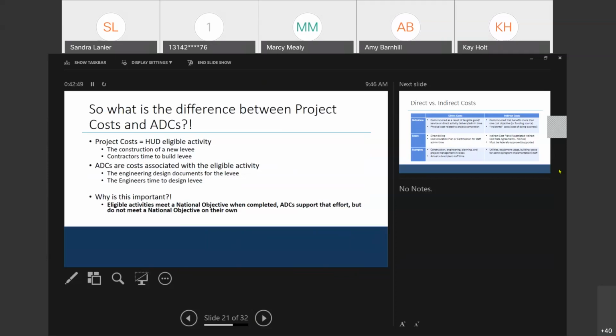specific to the activity, that's more broad, but this isn't a program where you're managing a program of several activities. You're applying for one specific activity, so everything really should be able to be pushed to activity delivery. If there are admin costs such as audit costs, those are always determined administrative. There are also costs such as reporting that we push down a certain level of responsibility for at the project level to the UGLUG. Those are administrative costs, so we expect them to be built in by local cash, because you can't pay for a single audit in kind. But the reporting element of that could be performed by in-kind services.